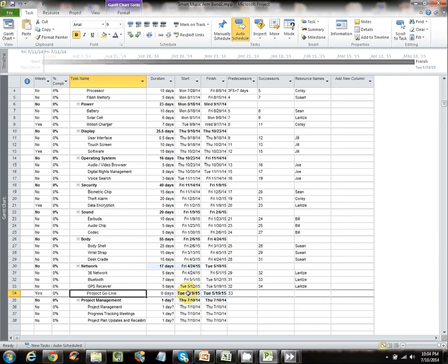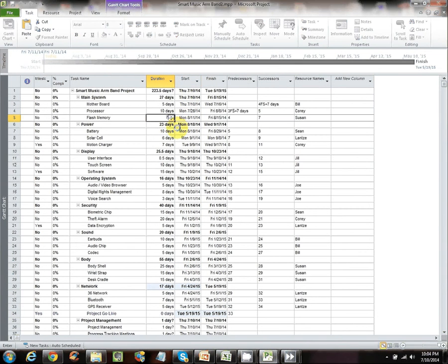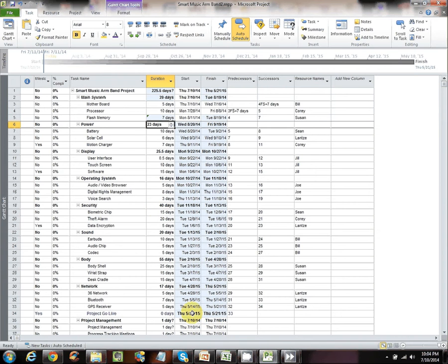That's how you are able to determine whether your project is dragging out too far, and if it is, you have plenty of time, if you build your plan properly, to recover. If you are late here and this becomes a 7-day task instead of 5 days, okay, it moved you up by 2 days, but it moved you up by 2 days in August. You don't go live until May. You can probably find a way to recover the 2 days here if you know that you've lost those 2 days. So it's important to have that. Okay. Alright,